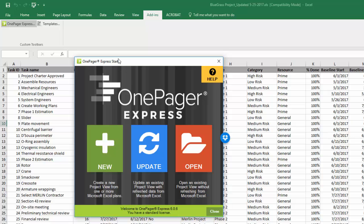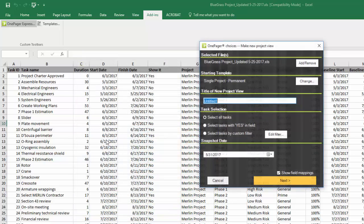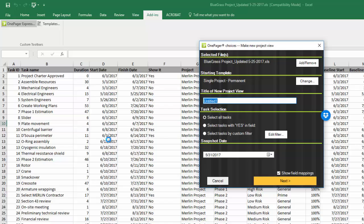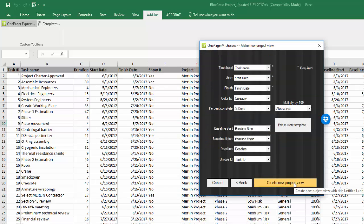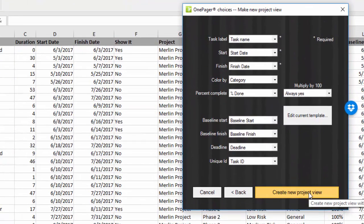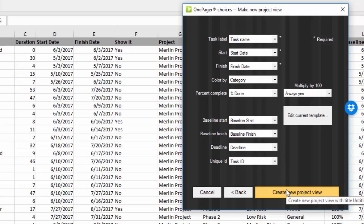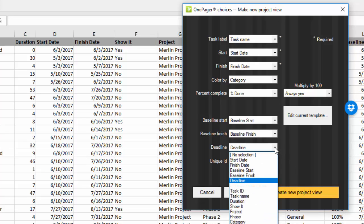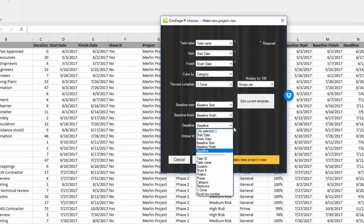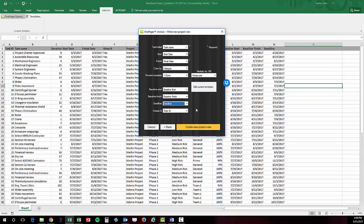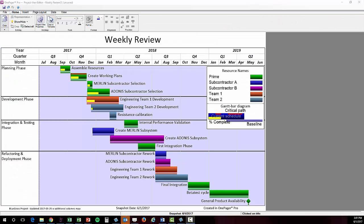If you have other columns in your data that you'd like to use in your OnePager file, that is easy to do. When you've got your Yes values in place, you can click the OnePager Express button on your Add-ins tab in Excel to launch OnePager. The first two pages are essentially the same between Pro and Express. Click New, select the template you desire, add a title, ensure the column with your Yes values is showing in the task selection dropdown, and finally choose your snapshot date. From here you will hit Next. This page is where you will confirm certain column mappings for OnePager.